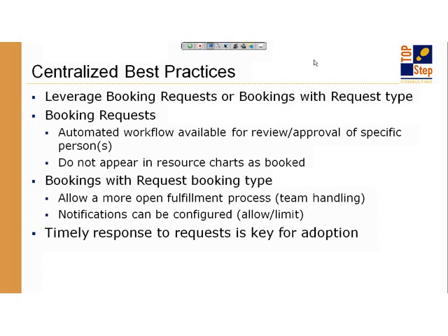Okay? OpenAir actually supports the request process in two different ways, and it really depends on what kind of notification structure you want to put in place and what kind of automation you want to take advantage of. One of those is the booking request. This is something that may or may not work for you. Booking request is very similar to a timesheet approval process or an expense report approval process, where you do have somebody filling out the request, submitting it, it gets routed to someone for review and approval, and that is more of a request fulfillment approach.